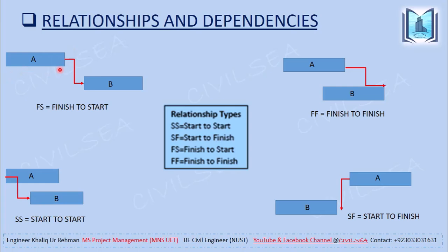Here you can see that when activity A finishes, activity B starts. Finish to finish: when activity A finishes, activity B also finishes. Start to start: when activity A starts, activity B also starts. Start to finish: when activity B finishes, activity A starts. In practice, this is a very rarely used relationship. Moving forward,